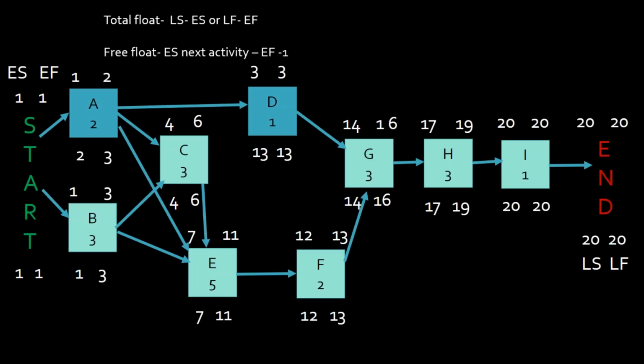But right now, from what I showed you, a forward and back pass calculation based on the example that I showed from 1.3.5, and I've taken it this far. We identified the duration of 20 days. We did a backwards pass, which identified critical path, P, C, E, F, G, H, I. We see that A and B have float. We want to do 2 different types of float calculations that they'll ask you about on the exam. Total float and free float. And once we do these, we're going to be done for the night.